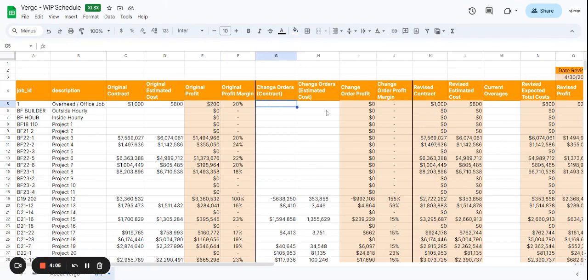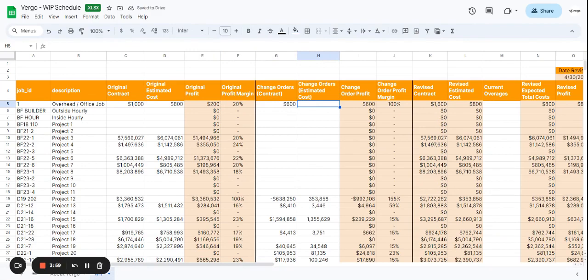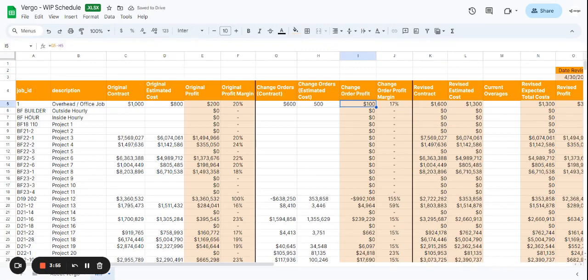Next here, if we have any change orders, let's say there's a $600 change order. The estimated cost is going to be, let's say, $500. That gives us a change order profit of $100 and a change order profit margin of 17%.